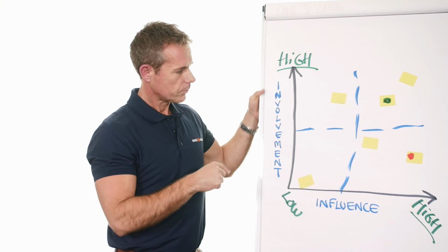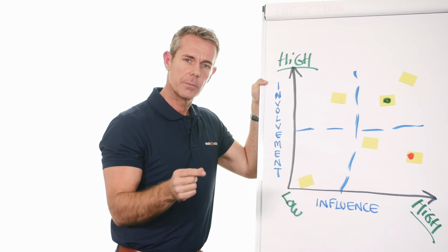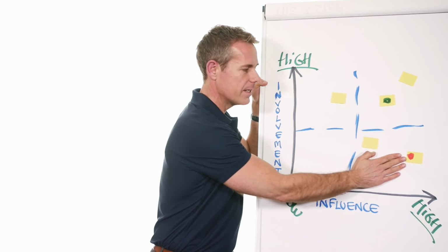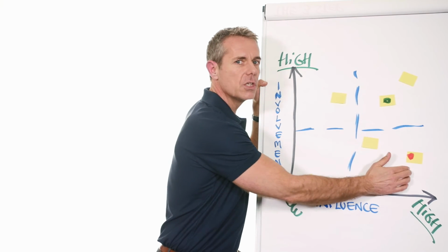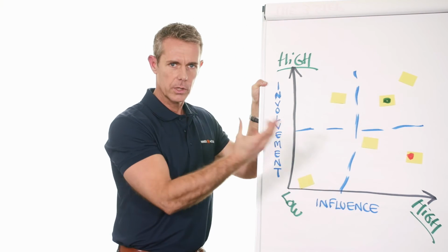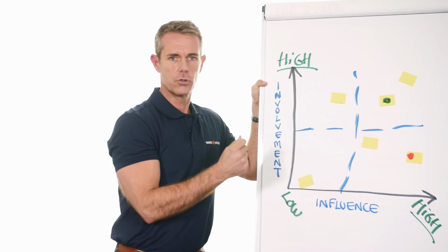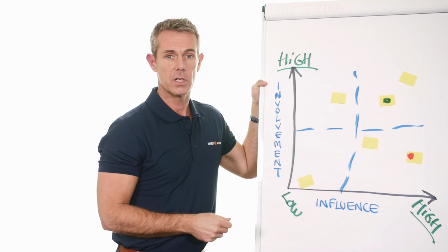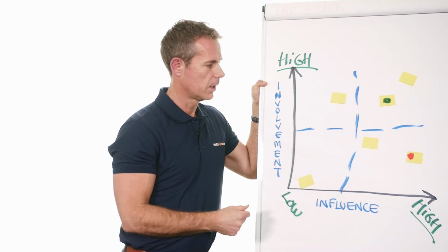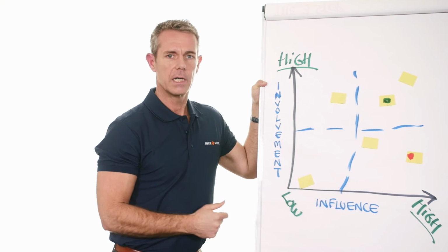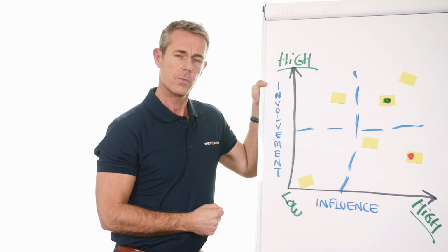And also, in the beginning, I talked about risk assessment. This negative person in your surroundings should also go directly into your risk assessment sheet as a probable risk, especially if they are as influential as this person here.